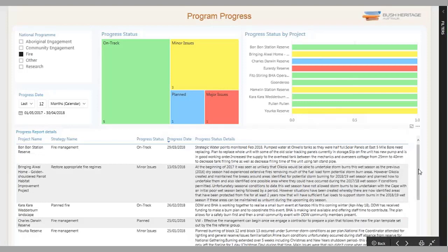So is Microsoft BI pulling this information live out of Miradi as we're going through? No. Right now we're running reports to dump data out of Miradi Share, and our finance system and our business system, and then Power BI is reading that. So we've got a monthly refresh arrangement, and that's primarily because our finance people will only put out data every month when they finish all the reconciliations they have to do. So there's a good reason for monthly finance data, so we've lined up the other systems to follow that same model, so people can update any time, but we'll extract the data every month.